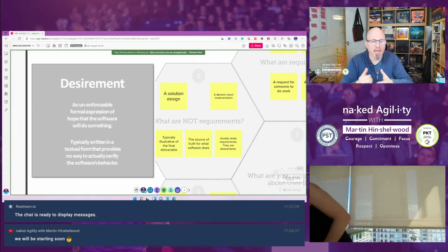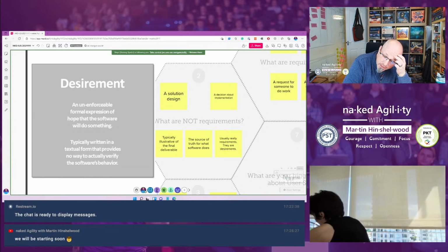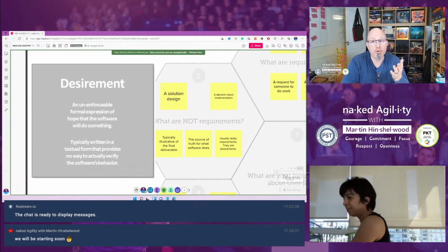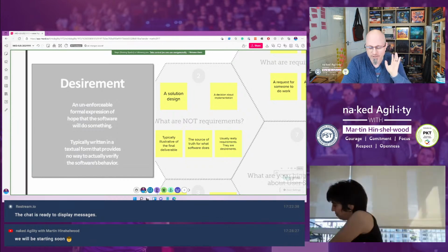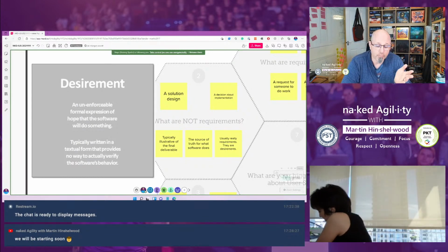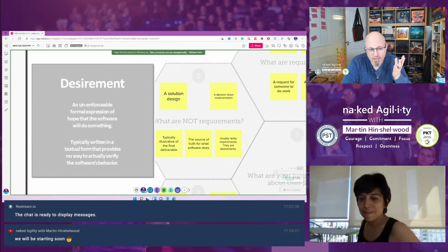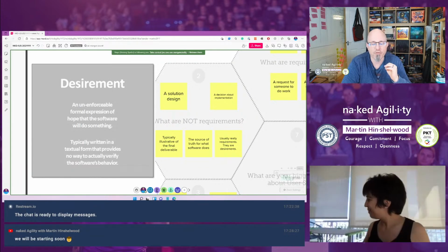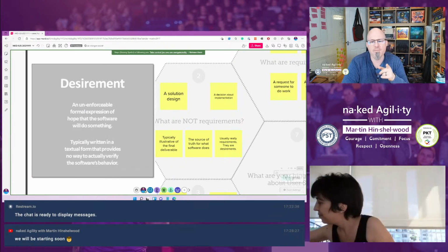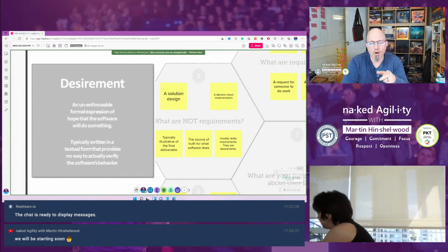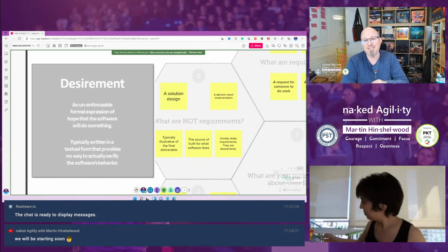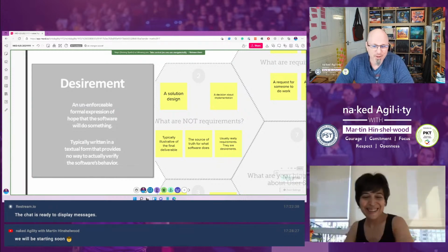How big is that thing? That for me is the value in story points. But lots of people use the numbers later for their velocity and various things. That's cool. I prefer the Kanban metrics, but I do work with teams that use velocity. Just don't do what one of my teams did, which is sign a contract with the customer where velocity was specified in the contract and they had to be within 15% of their expected. Don't get me started on mental things people put in contracts.